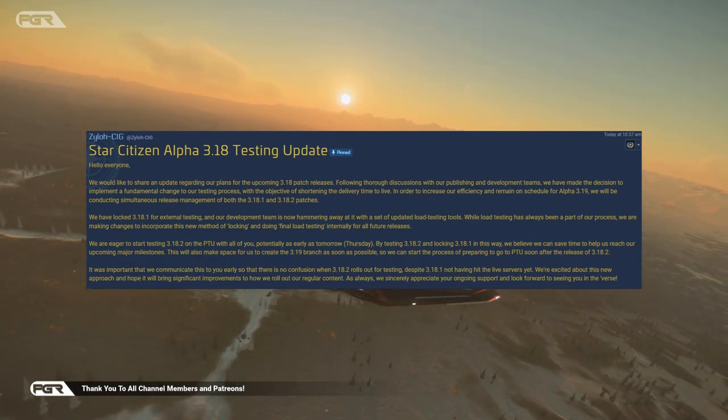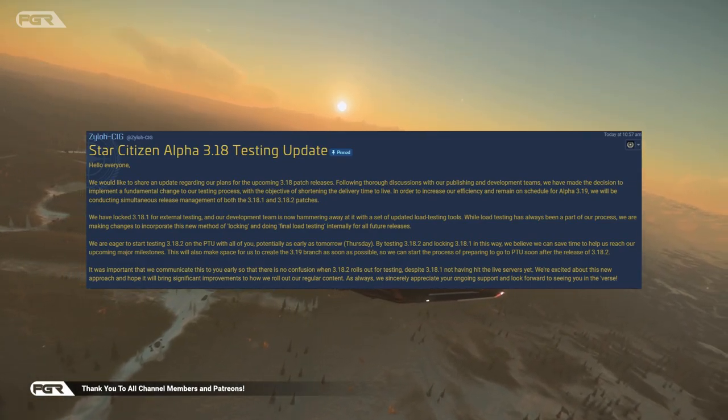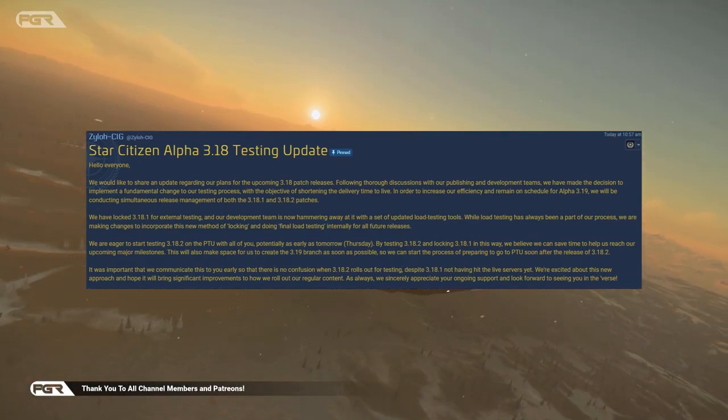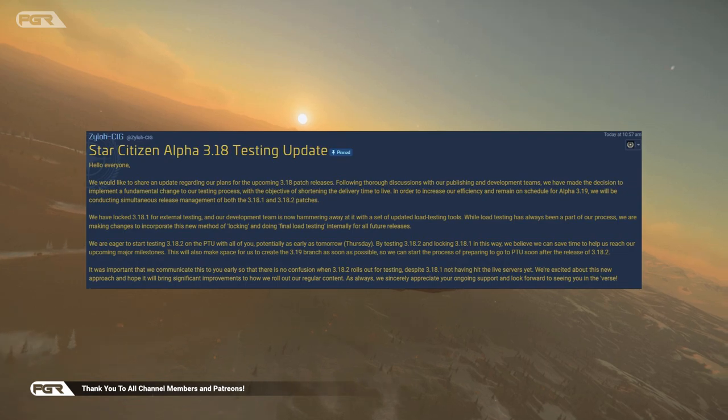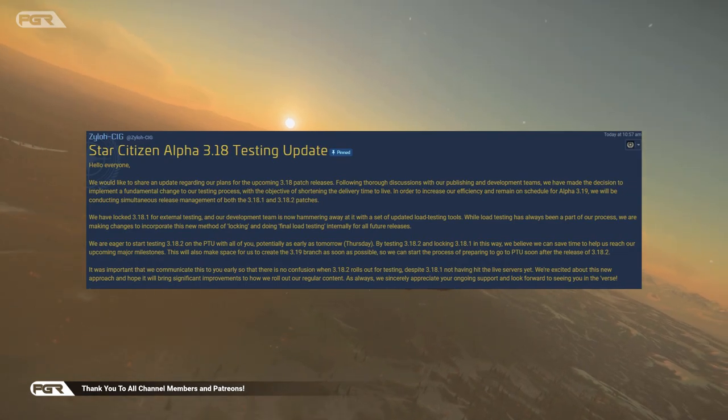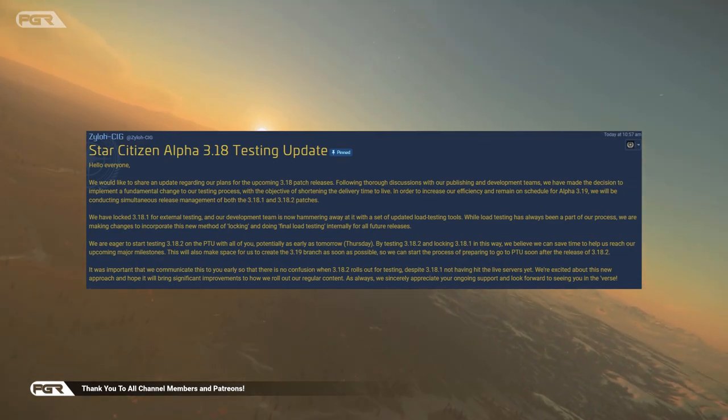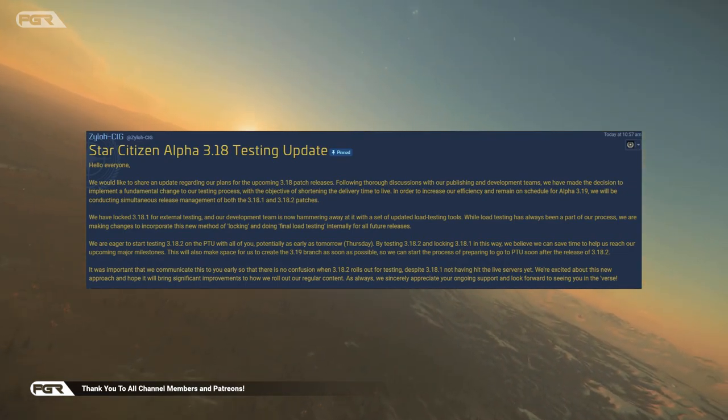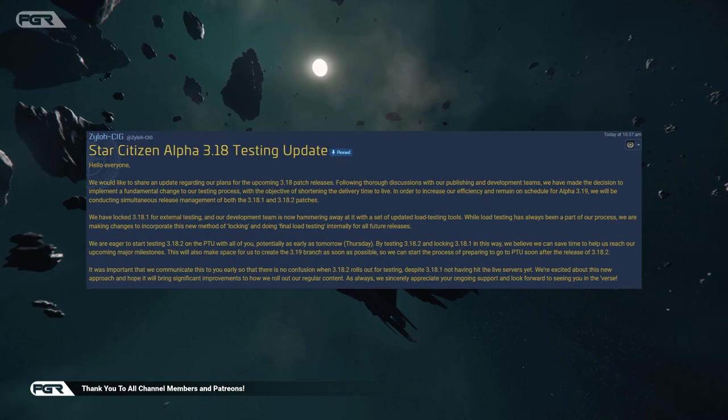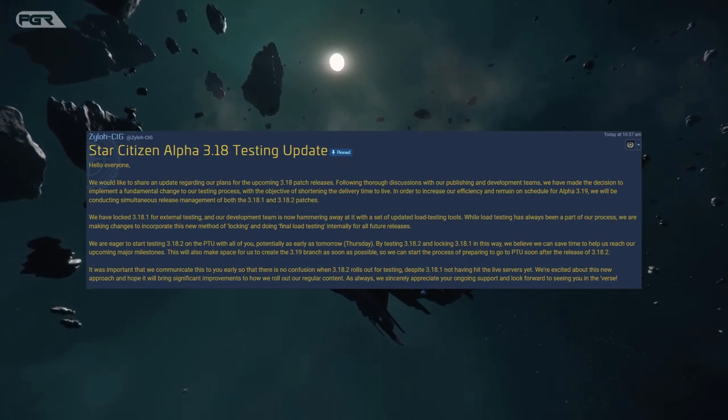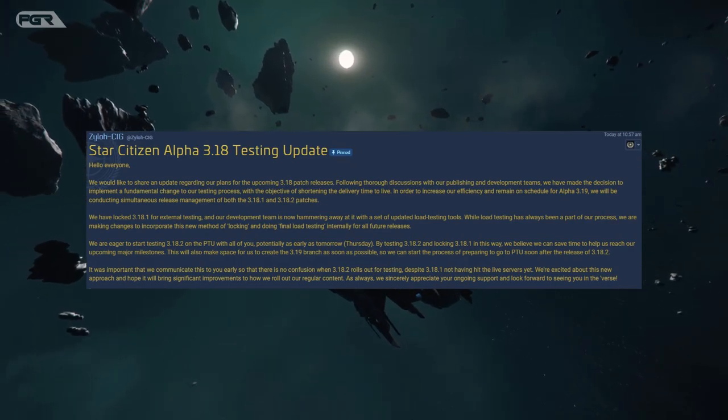In order to increase our efficiency and remain on schedule for Alpha 3.19, we will be conducting a simultaneous release management of both 3.18.1 and 3.18.2 patches.